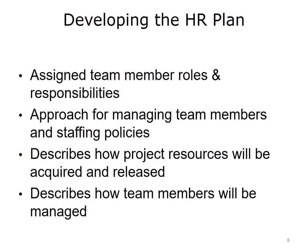After the project team has identified all activities that must be performed, they determine resource requirements which are used to develop a human resource plan. Resources on an IT project could include a business analyst, systems engineer, system architect, database administrator, and any of a number of other roles. The Human Resource Plan development process involves identifying and documenting project roles and responsibilities. There are three key inputs that assist in the development of an HR plan: enterprise environmental factors, organizational process assets, and activity resource requirements.